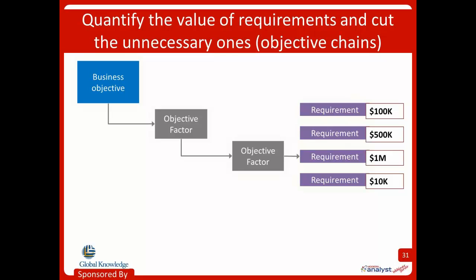So what we do is evaluate each requirement to determine how much it is going to contribute. I suggest you group requirements together so that you're only doing this comparison on 10 to 20 things at a time. You don't have to do it on every functional requirement; you can group them and do it on things like features. The other important thing is you don't have to be precise.